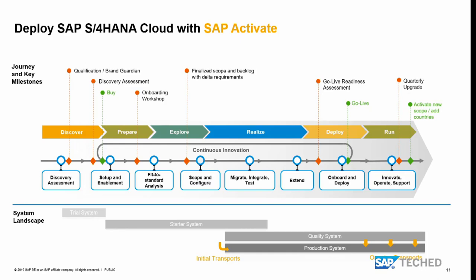It supports all phases from the prepare phase on until the run phase. You see here that in the prepare phase, it's foreseen to do the setup and also the enablement of your team. And in the explore phase, mainly the fit to standard workshops take place. And here it's important that it's not the fit gap workshops, it's really fit to standard workshops because they really try to be focused on the standard.